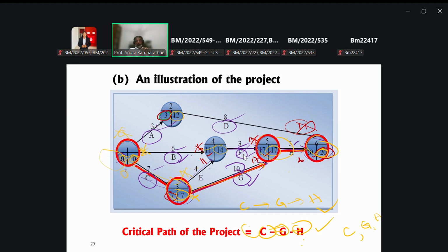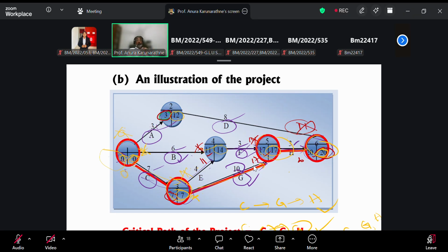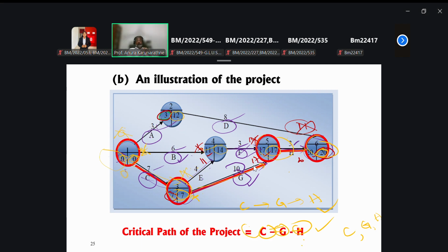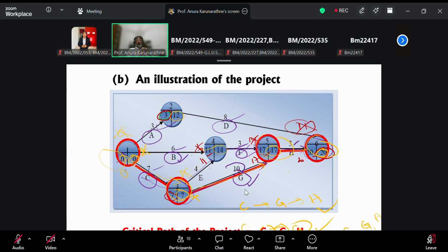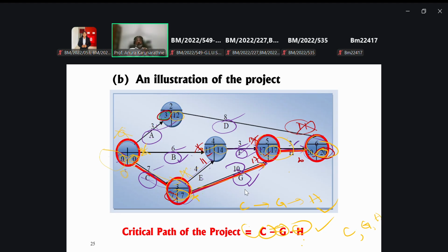So you have to think about different scenarios, different situations, different time estimation, especially three time estimates: pessimistic, optimistic, and most likely. So you have to take the expected value in order to convert these three time estimates into a single one. So you can go for the probability and formula to obtain the expected value.